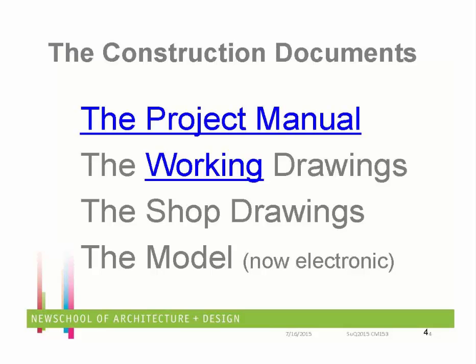So today, yeah, Raymond. Okay, the working drawings are the actual drawings that the architect and designer produce. They show materials, room arrangements, finishes, reflected ceiling plans. They show the aggregated information of the whole project, with details of how you want it to go together. The shop drawings are every specific set of details that pertain to my material. Like, there's going to be a book this thick that has the shop drawing information for every door. What frame is it? Okay.